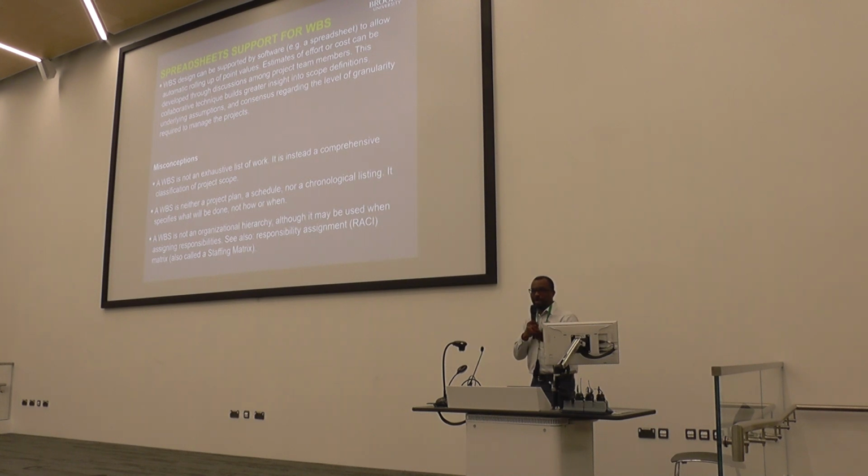When it comes to building works, will the lift contractor want me to finish the lift wall for him or her, or will the lift contractor itself want to come in? So you need to consider some of these things and look at the interface that exists between the different work packages and how you're going to manage it. A very good work breakdown structure helps you in procurement. Because if you're able to break your work breakdown structure into the right work packages, you then get to know who does what. It's easy for you to bring in your various subcontractors as well, because when they come in, you tell them, this is the work package I want you to do, and it helps you in that planning as well.